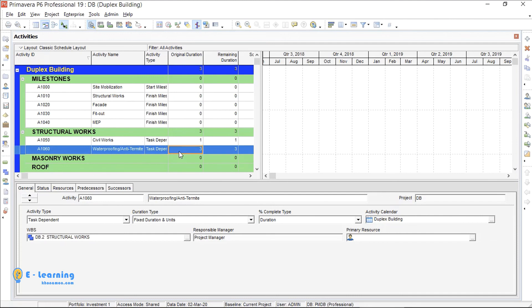Now you can also copy paste all activities from Excel file to Primavera. You can see the duration and activity name there. Also all are task dependent.